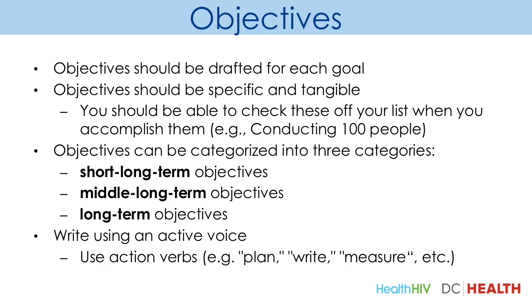Objectives should be able to relate to the activities that you include in the evaluation and methodology sections of the grant. An effectively drafted objective should have the ability to link to the goal statements of the proposal. As well, it should be written utilizing terms of measurement while also specifying a range of time and a target audience that will be impacted. Effective objectives have the ability to contain answers to questions like who, what, where, when, and how much.